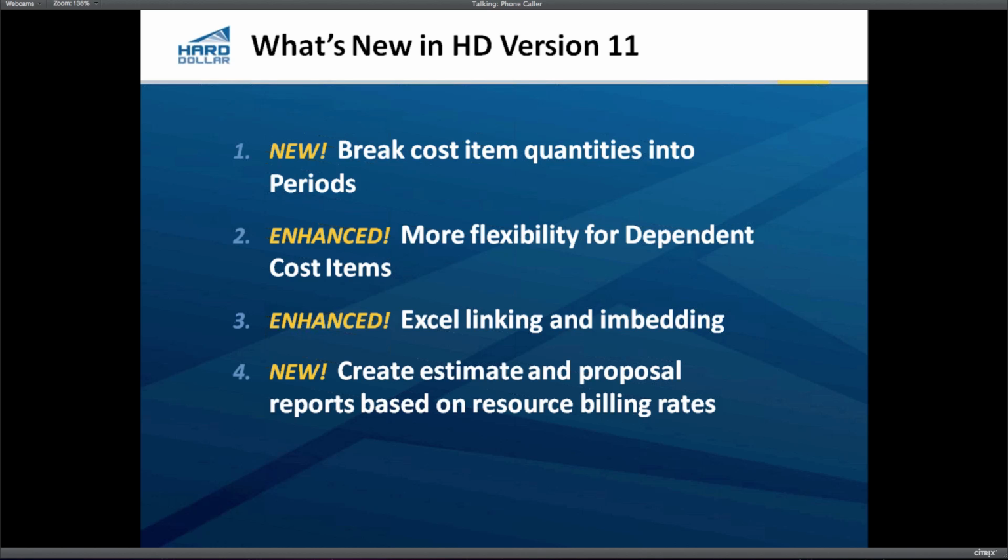In some of the mining projects, they're looking at kind of a life of mine scope where we're talking about 30, 40 years in some cases for these projects. Okay, so the issue there was when we're looking at a cost item, whether it's a shaft or a drift or a bridge or whatever it is, rather than having to break that out into what are we doing in year 1, what are we doing in year 2, what are we doing in year 3, which adds to the CBS structure, makes the structure much larger.